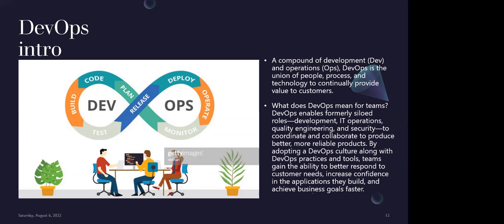Traditionally, the way we do things today is developers develop on their laptop or on their server somewhere. Then they compile whatever they deploy. It's called an artifact or a package. They send it to the testers. The testers run their tools, they check for bugs, they check for vulnerabilities. The testers themselves can take up to a month to test. Once they discover a bug, they return it to the developers, who spend another month fixing all of those bugs.